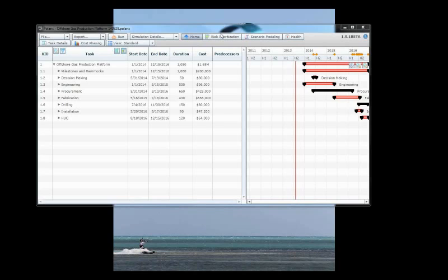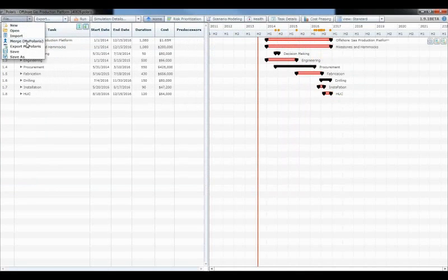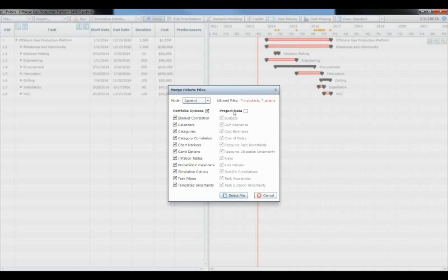It was around the projects I work on. If you're importing from P6 every month, can you do a kind of schedule update function without having to rebuild your whole model? Absolutely. So we have functionality called merge. What you can do is import an entire new schedule, and then you can merge data from past projects.